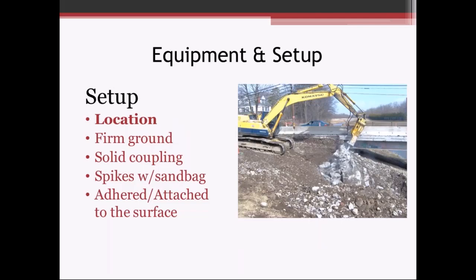Something else about the equipment is the setup, and location. You hear real estate agents all the time say location, location, location. That certainly is very important when monitoring construction vibrations. We want to make sure that it's set up properly and in the right location. To have a seismograph set up right here next to this hole ram, you're certainly going to be measuring the vibrations that this hole ram is producing, but it's not going to tell you a whole lot about what's going on in this house back here in the background.